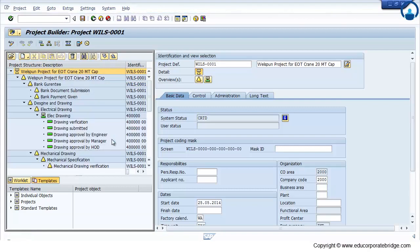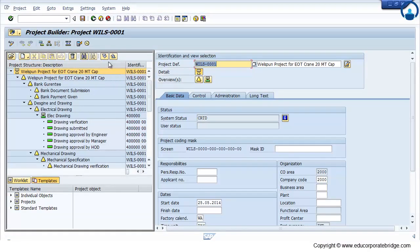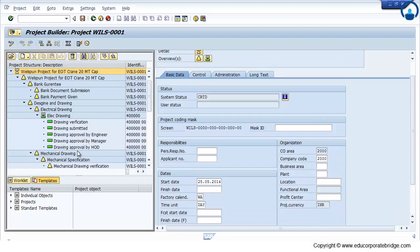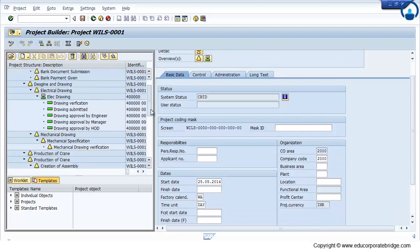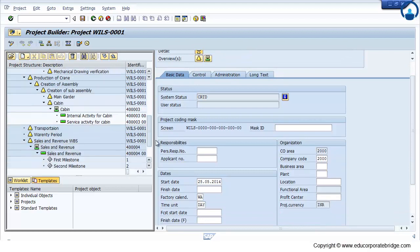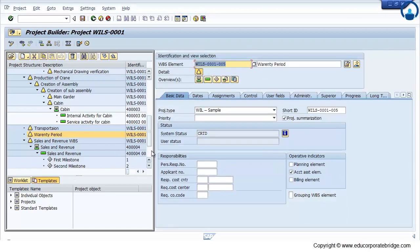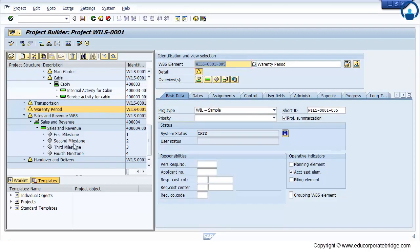So in this particular project, we have created a WBS, sub WBS, network activity, internal external, external service activity, and milestone.